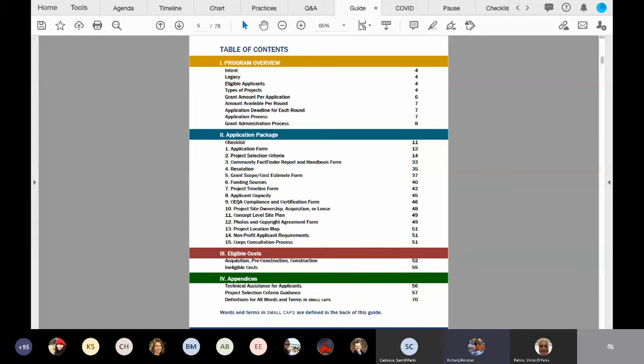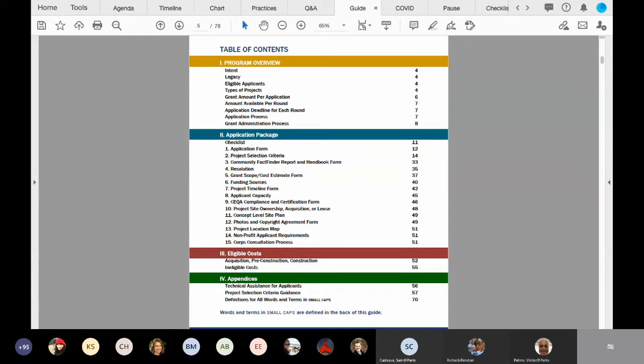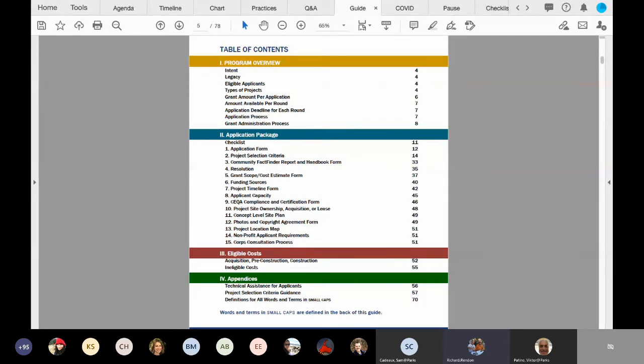Section three deals with eligible costs for the acquisition, pre-construction, and construction of a project. So when you are developing and planning your project, be sure to carefully review the eligible cost charts on pages 52 through 54, and also the ineligible costs on page 55. These will help guide you in knowing what exactly is eligible for reimbursement under the Statewide Park Program.